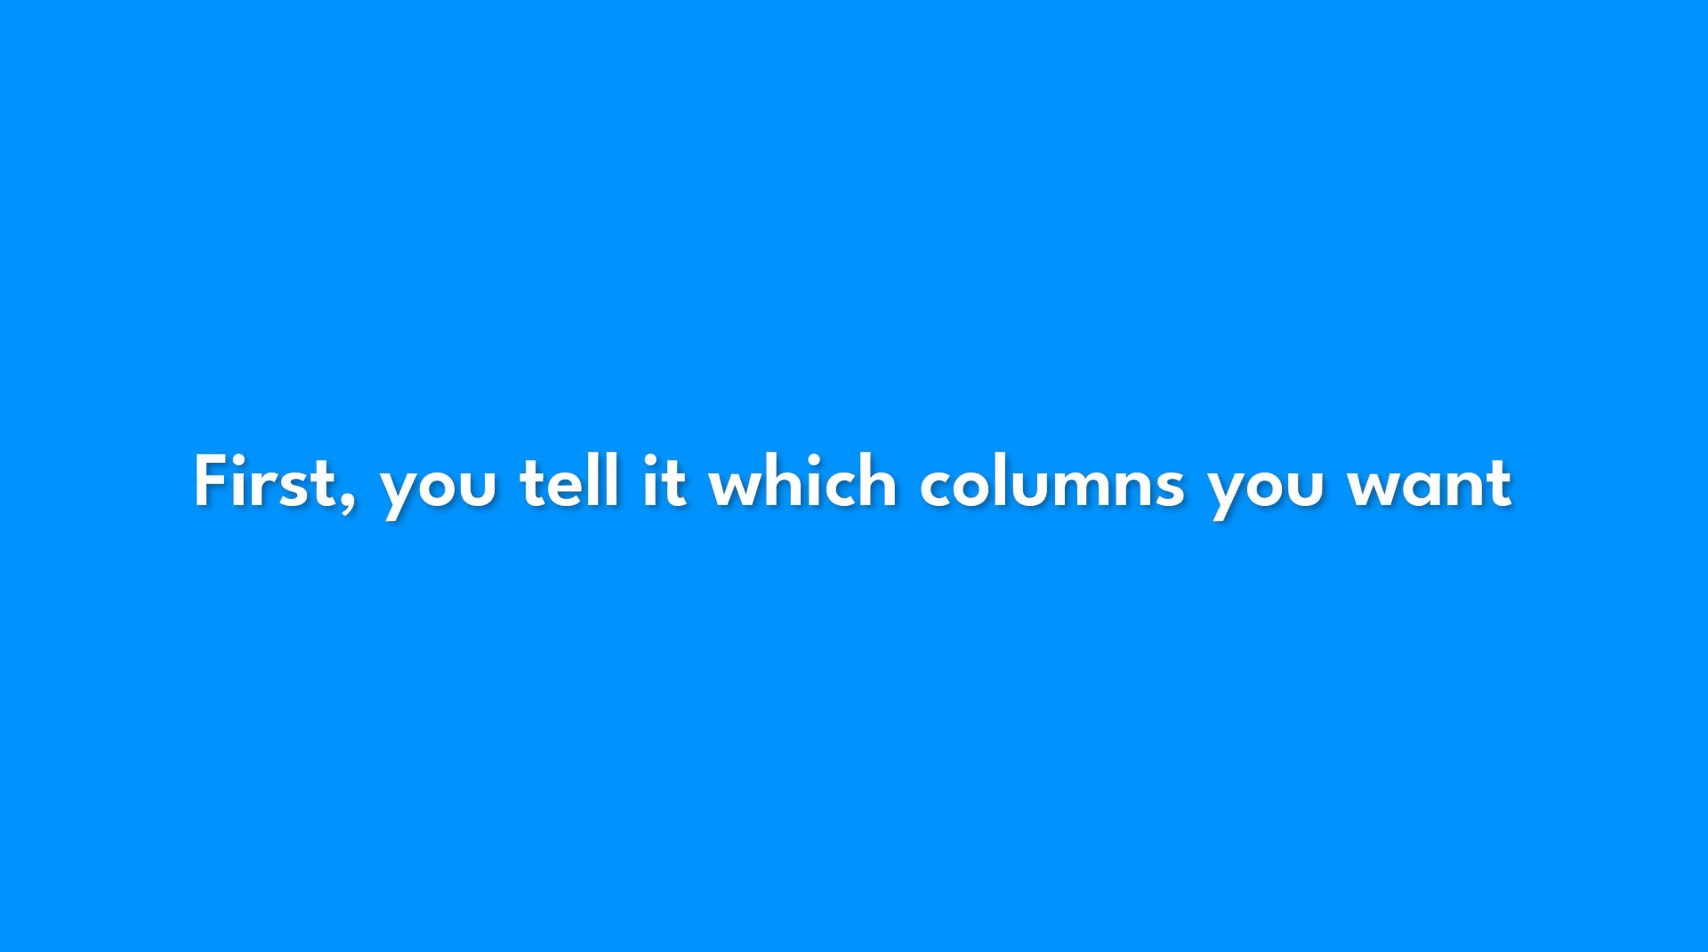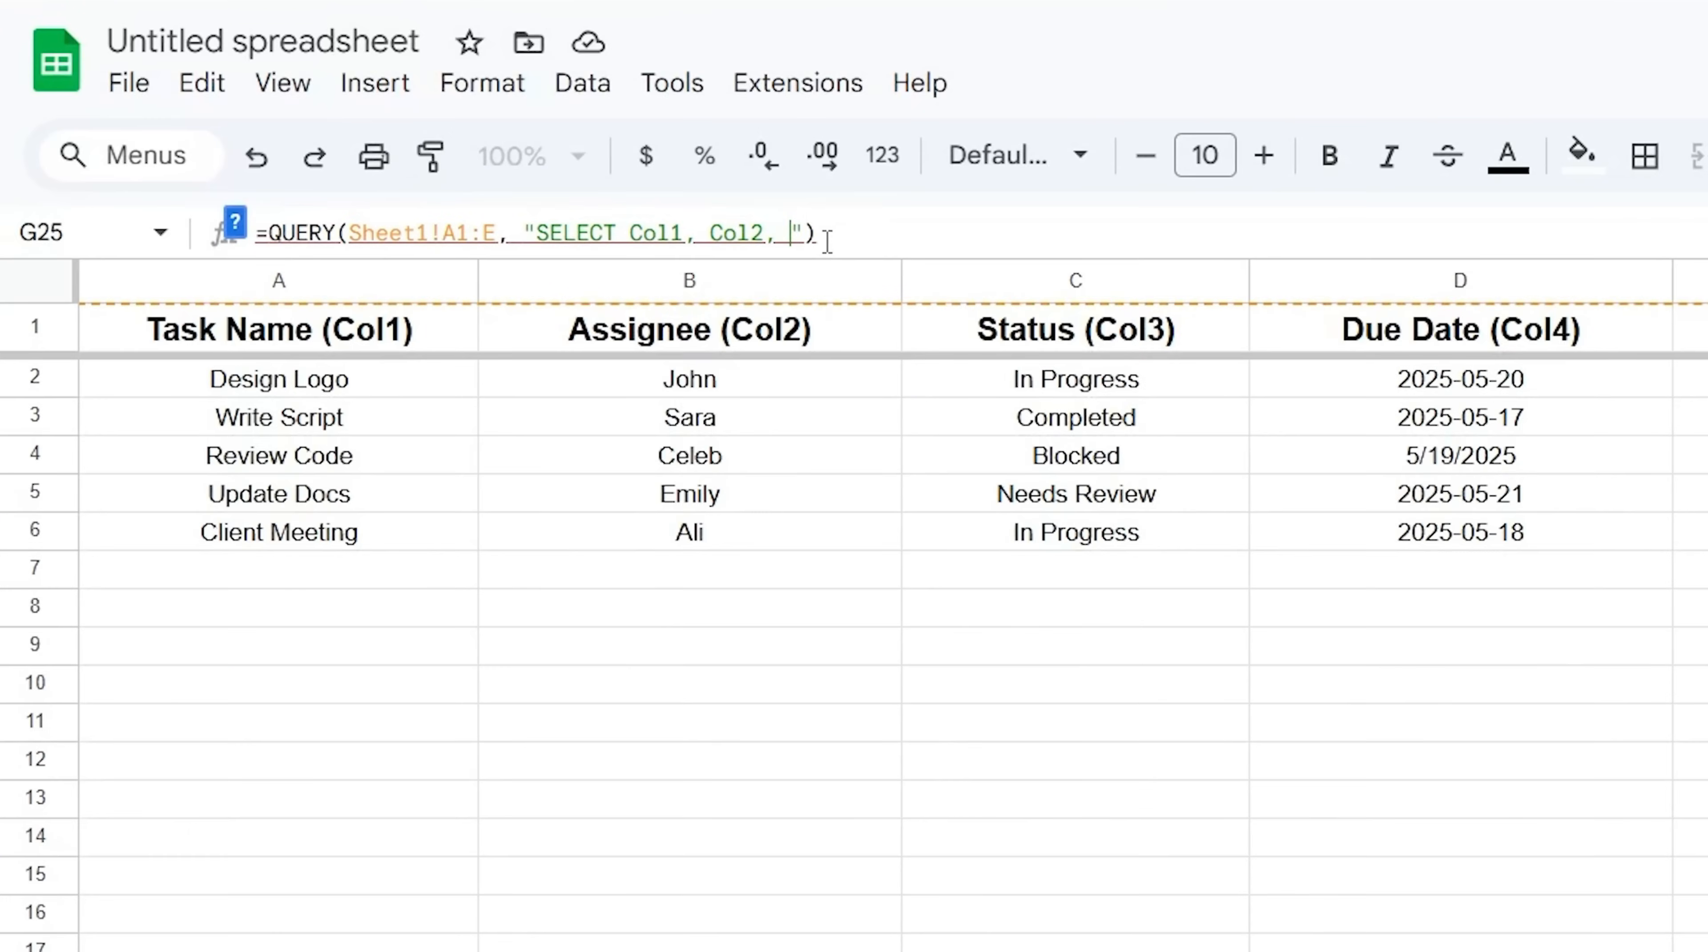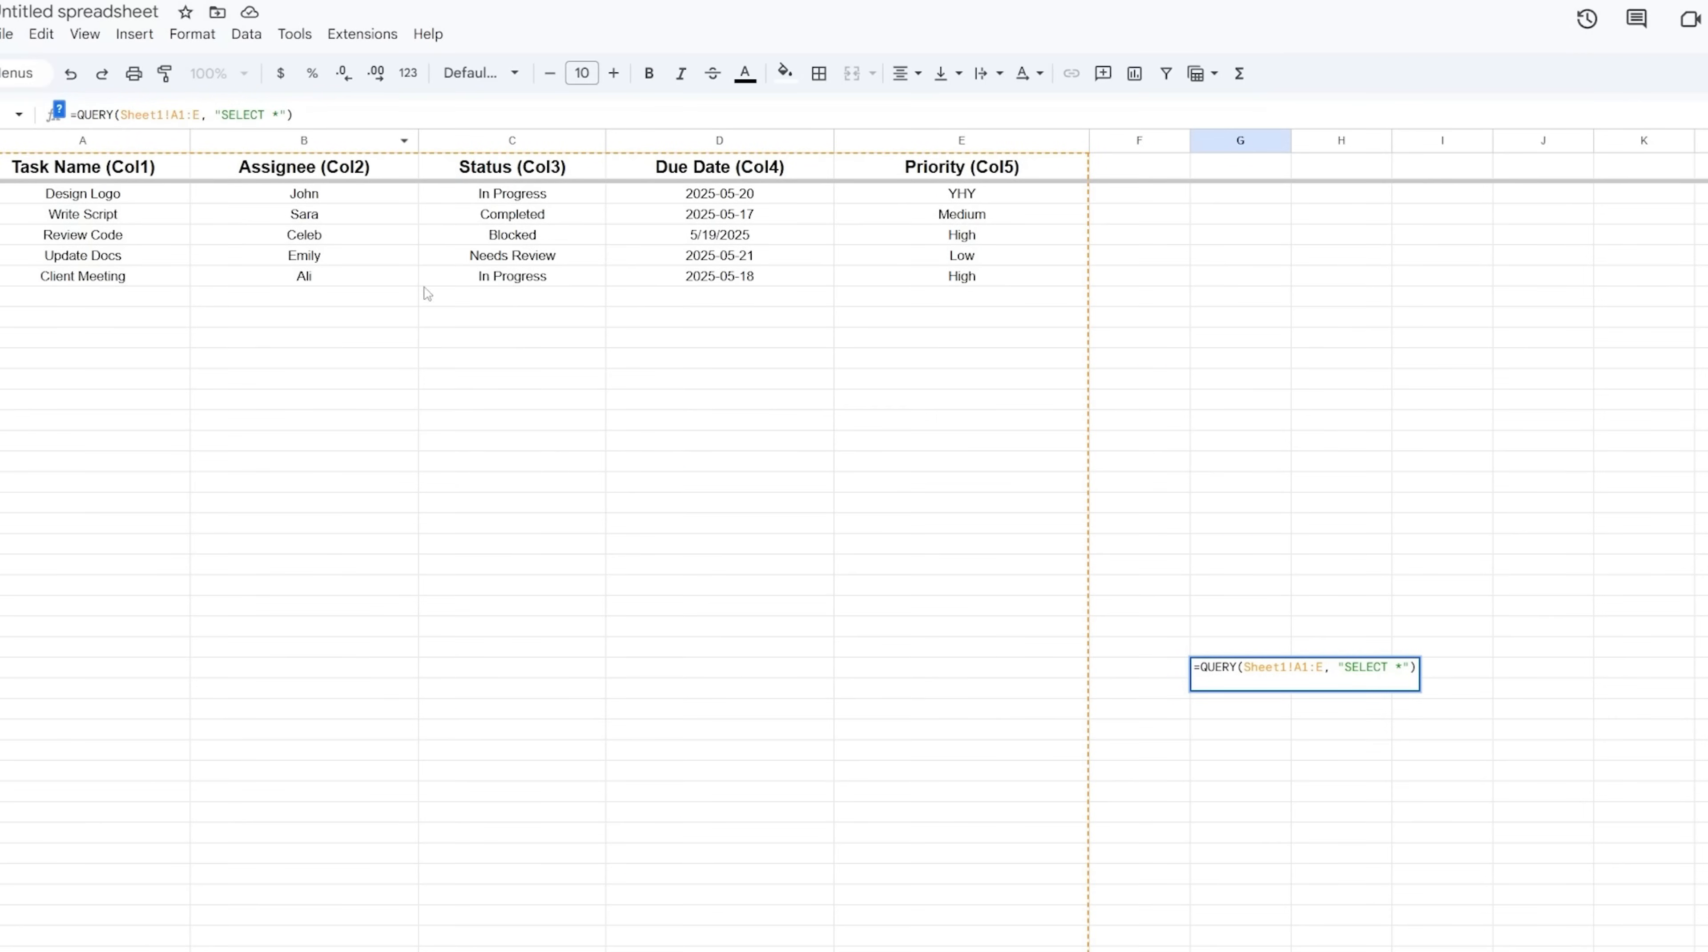First, you tell it which columns you want using the command SELECT. If your data is in columns A, B, C, D, etc., QUERY sees these as Column 1, Column 2, Column 3, Column 4, and so on. It's important to use the column number inside the quotes. So if your task list has task name in column A (or Column 1), assignee in B (or Column 2), status in C (or Column 3), and due date in D (or Column 4), and you just want to see the task name and assignee, you'd say SELECT Col1, Col2. You can list them in any order you like. If you want all columns, you just use a star: SELECT *.